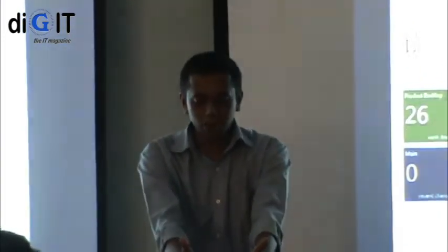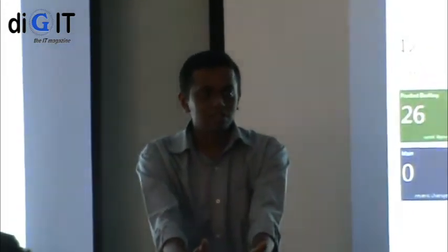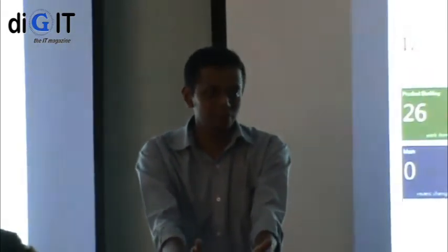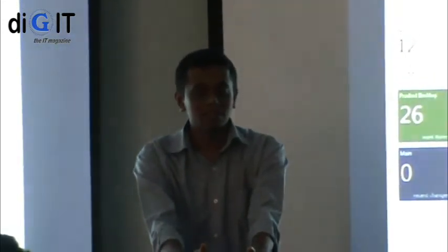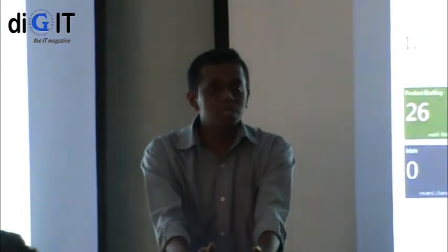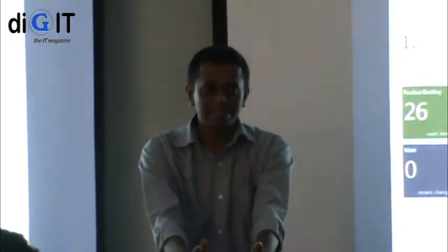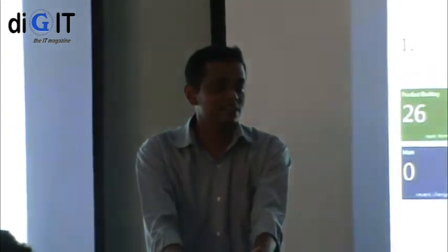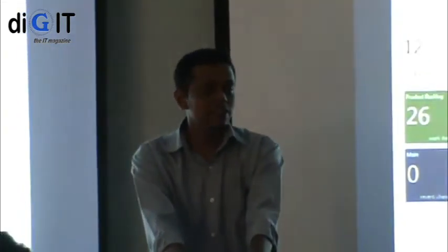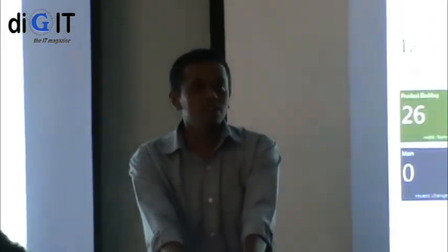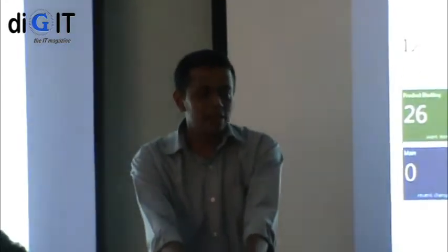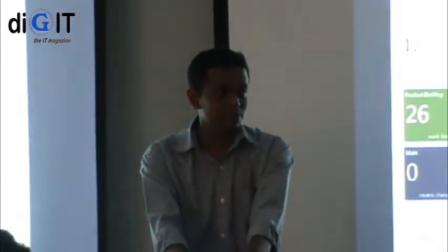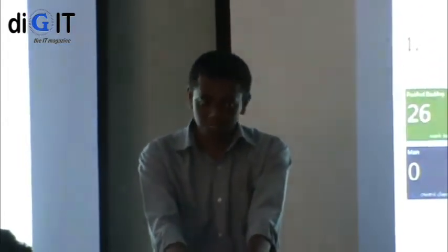If you are doing a project of about 6 months, we should give them something at least within 2-3 weeks, for them to see and give their feedback. And what we are giving should be a most important part of their business. That should add some value to their business. That should be a core functionality of their daily business running. So if they see some problem in that, they will immediately come back to us and tell us, we should have it in this particular way. So if they tell us that in 3 weeks' time, rather than at the end of 6 months,